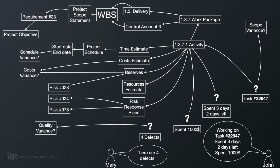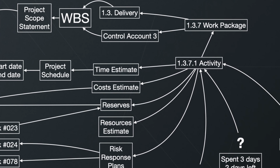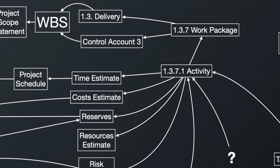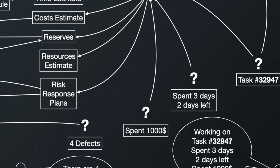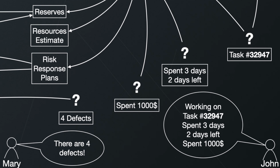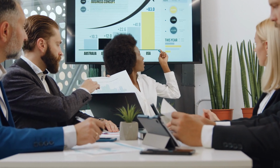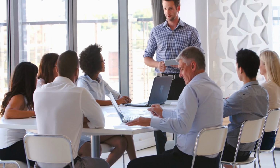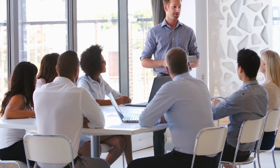So the idea is simple. You try to analyze the accuracy of your estimates and your planning in general during the creation of the first few deliverables, and based on that, you correct the whole project plan early on. As you understand, for this meeting to be efficient, you need to collect all this project information in advance and present it to your team. Then you want to ask some questions, why they think we missed the deadlines, why our estimates were not accurate, and so on. Alright, I think you got the point.